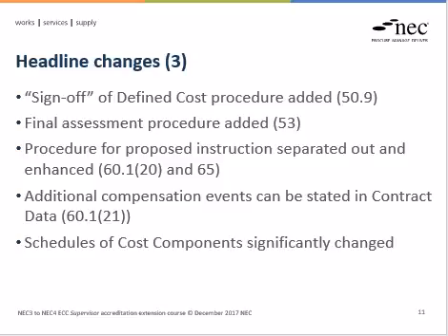The NEC concept of proposed instructions, which was rather slim, has now been brought into a full clause in its own right. New additional compensation events can be stated in the contract data under clause 60.1, and the schedules of cost components have been significantly changed and simplified.